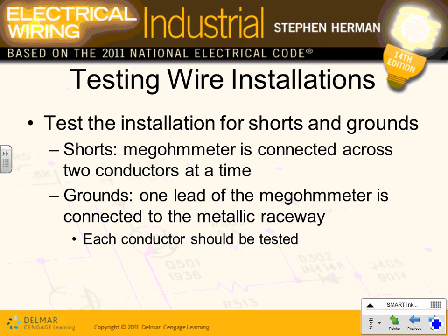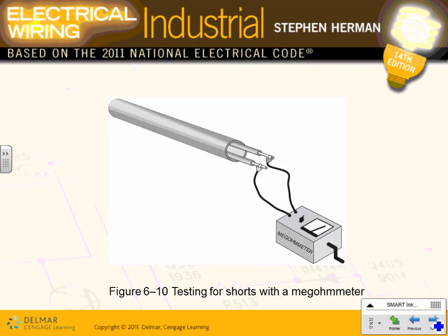Okay, testing wiring. We talked about testing wiring. You test for short and long pole test, and you test it with a megohm meter. Each conductor is tested separately. Here's how you do it.